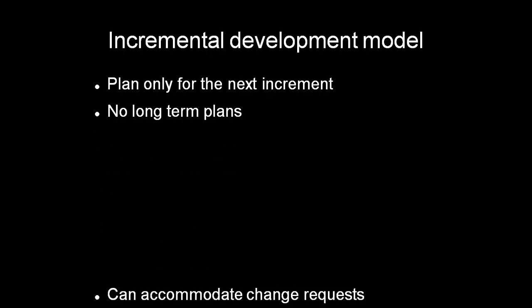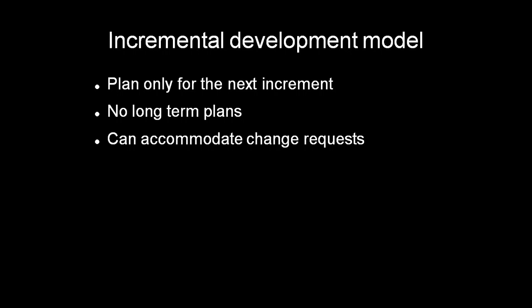The thing is that we'll plan only for the next increment. We need not have long-term plans. We just plan for the next increment only. Then we can accommodate change requests from the customer, because when we deliver the first version of the software, the customer will make some suggestions or some changes. So we can accommodate those changes when we release the next version of the software. That is another advantage of this incremental development model.